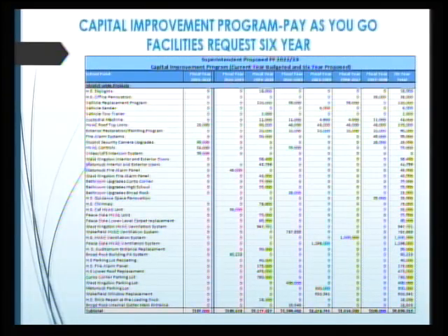And just to further reiterate that statement for folks at home looking at this graph, which might be very hard to read, the basic brass tacks here, so to speak, are FY22-23 here is $180,000. The reason that number is so low in comparison to the other years that you're seeing on this graph or chart is because so much is up in the air in terms of facilities planning that we're not going to spend money on facilities that we don't honestly know are going to be there. So we're pushing probably some needed expenses into future years, keeping costs low this year, and that's sort of what we're looking at in this chart.